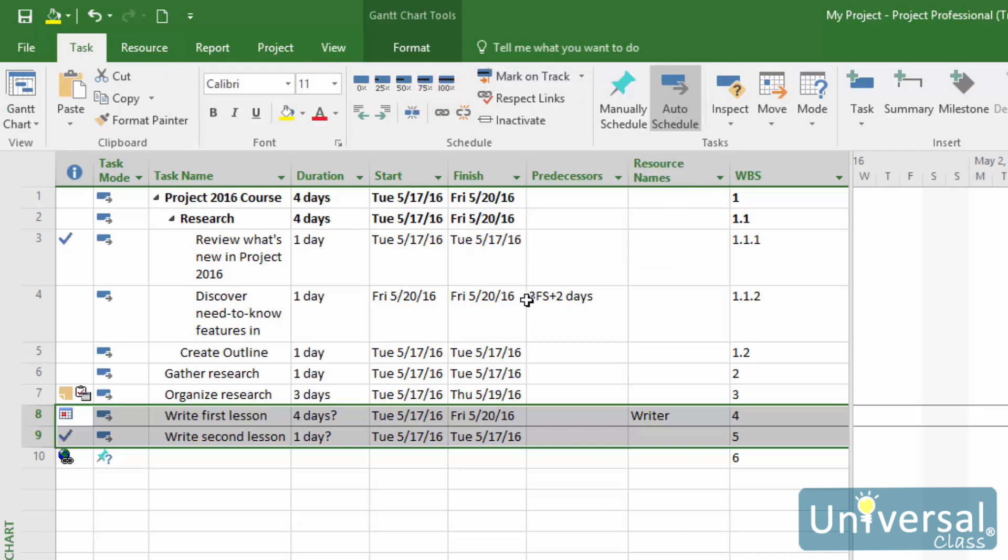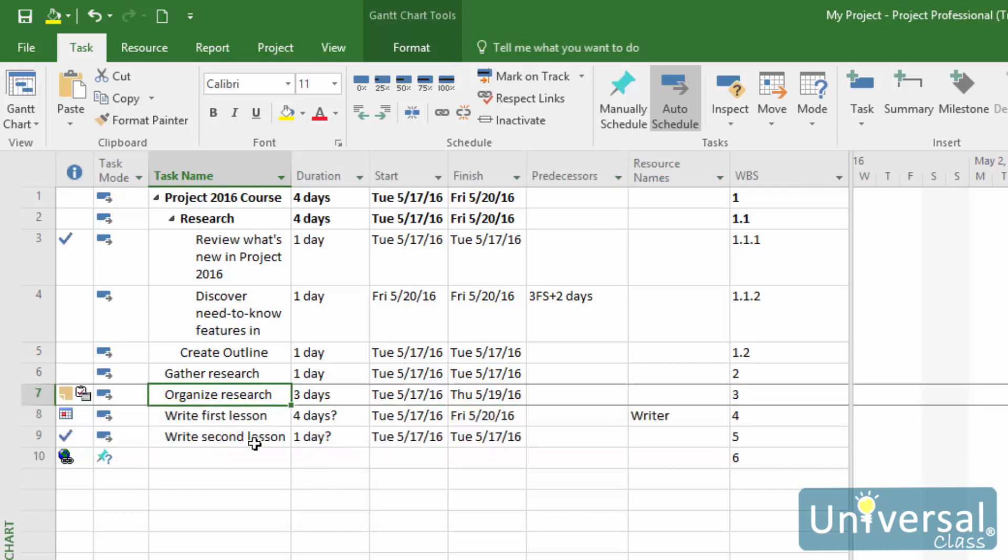If a task is complete, Project 2016 will automatically assume that the task was started and finished on time. However, if you're wanting to track progress, you'll want to enter the actual start and finish times for each task. To do this, go to either the Actual Start or Actual Finish fields in the worksheet area of the Tracking Gantt view.